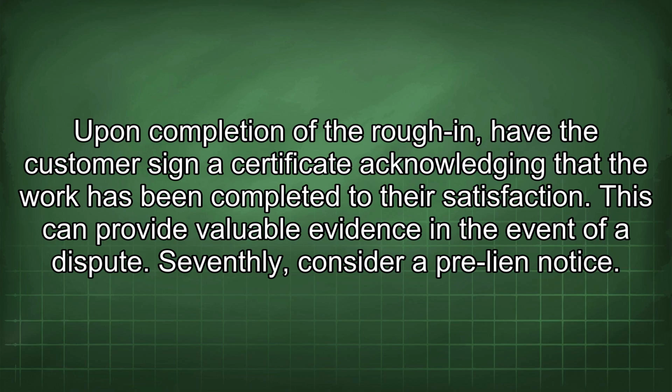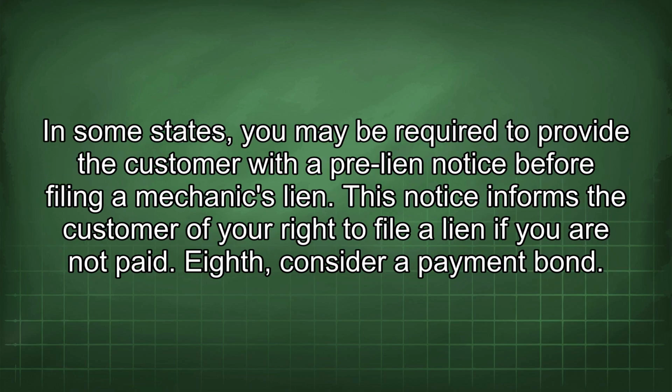Seventhly, consider a pre-lien notice. In some states, you may be required to provide the customer with a pre-lien notice before filing a mechanic's lien. This notice informs the customer of your right to file a lien if you are not paid.